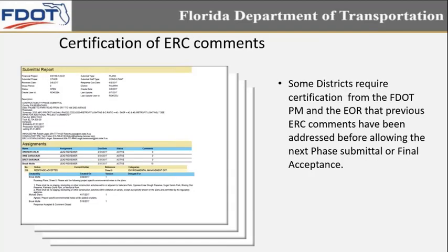And hand in hand with that is using the ERC comments as a form of certification. A lot of districts reported to us that they require certification from the FDOT-PM and the EOR that previous ERC comments have been addressed before allowing the next phase submittal or final acceptance. Some do this just before final acceptance as part of that meeting of the Phase 4. Some do it at each phase submittal, at the Phase 2 submittal to ensure Phase 1 comments, at Phase 3 to ensure